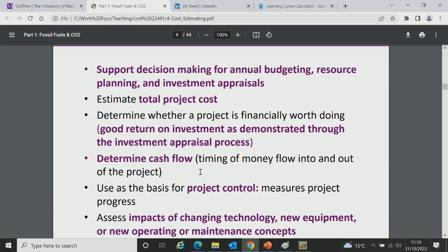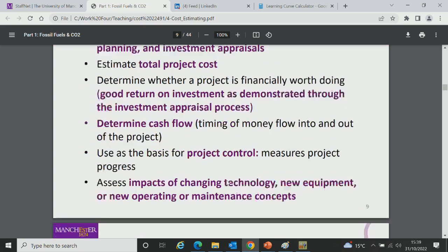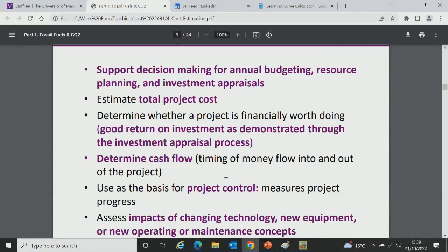Absolutely. You'll see in the slides that the time value of money is really important. The kind of costs we've got at the moment sometimes invalidates historical cost data as comparison, because the world is so unique at the moment, and in cost estimating we're in the business of drawing comparisons to make estimates. But inflation is actually the critical factor you apply to your costs, either to roll them forward or roll them backwards in time. You have to apply a year-on-year percentage factor to account for inflation. If you've got the historical inflation, you can do that accurately going backwards. Going forwards is not so easy.